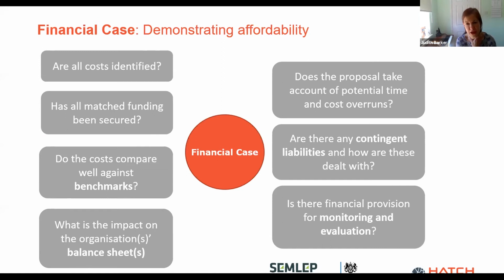Now, obviously, if you haven't gone out to procurement, you won't have your absolute final costs, but have you got a way of demonstrating that these costs are reasonable, maybe against a previous project or benchmarks? That's a good way of being able to demonstrate that you're offering value for money.